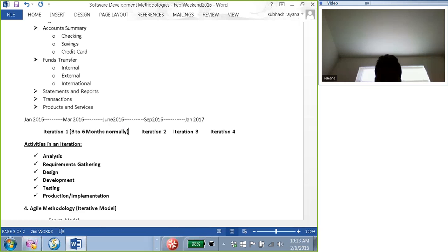The expectations are set very clearly. Right? There is no room for anybody to make assumptions and think that everything will be done in 2 months or 3 months. Whenever there is a scope that is being planned, the business has to know how long it's going to take to get it delivered. So the project manager is responsible for ensuring that the estimates are clearly identified and documented. There may be deviations, but the deviation cannot be 50-60%. There may be around 5-10% deviation.